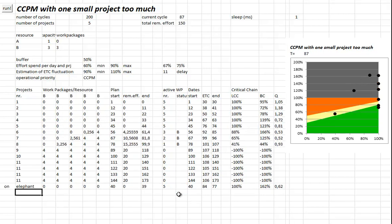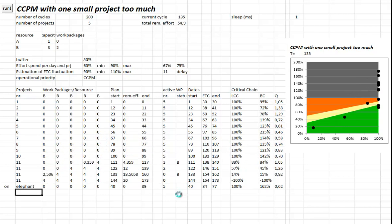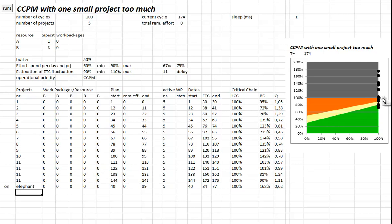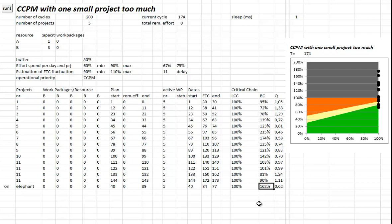After a while, the projects turn back to normal. You can see this in the buffer consumption. The elephant occurs at day 40. All the projects that finish before that will have no impact. You see the first three: 90, 70, 78. The moment the elephant occurs, the buffer consumption goes through the roof just with these few additional days. After a while it goes back to normal, and here the elephant - he had to suffer too.